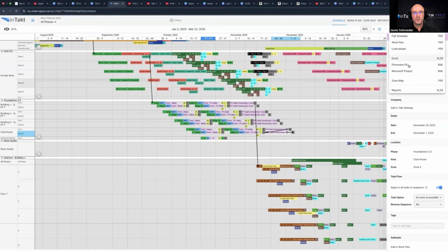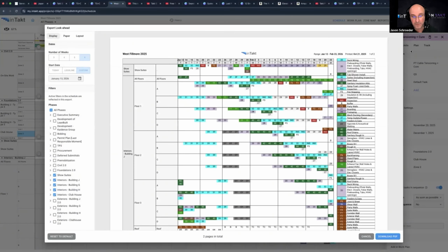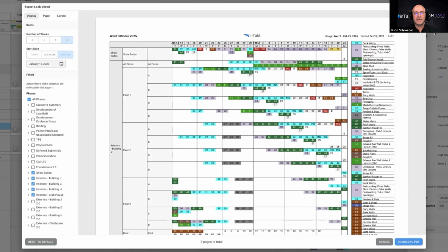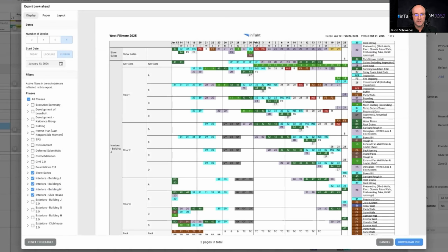And what you'll do as a part of this meeting, and I'll make it very simple, is you will set a 2, 5, or 10-minute timer, and you will say, trades, this is the look ahead that we collaborated on in the last planner system from the pull plan. This is the next 6 weeks. I need everybody, please, whether they're printed or they're on the wall, to look at your activities, and each one of you come up with a potential roadblock in addition to the ones that are on the wall. And then you identify, discuss, and solve them.